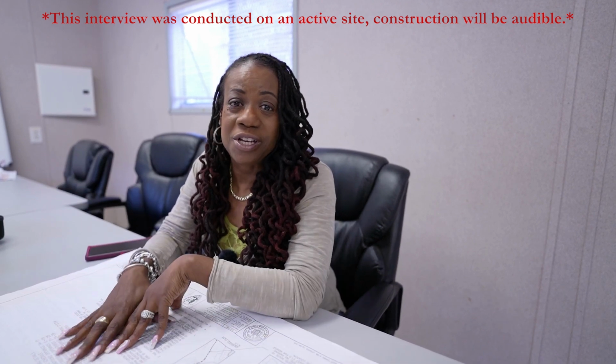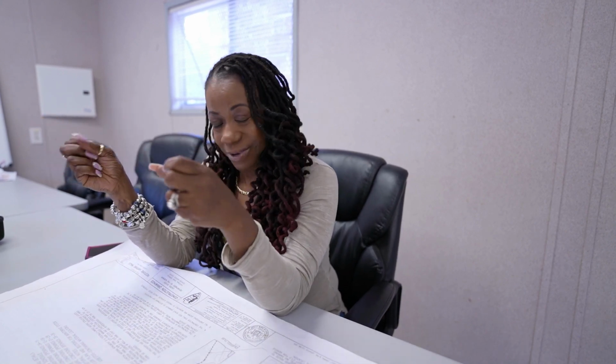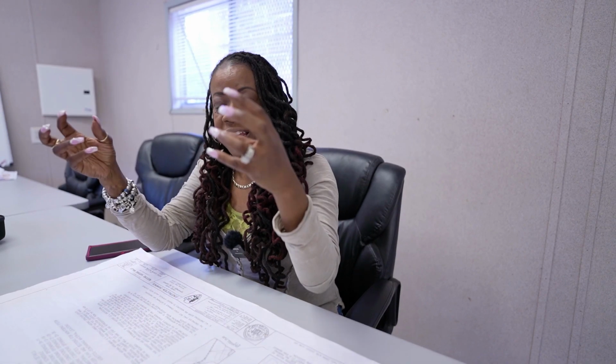And so we couldn't continue with the original plan on how we wanted to restore these architectural elements because it was concrete. So what we wound up doing was taking some of the patching material and fashioning the architectural element out of the patch material. So at the end of the day, you couldn't tell if it was stone or not. And it was such an excellent job.